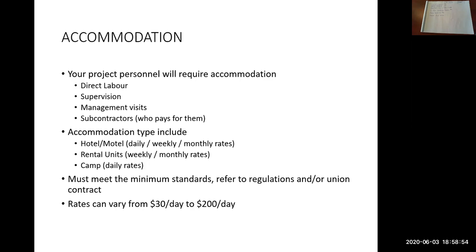So accommodation type, those things can include things like a hotel or motel. Depending on the duration of the project, you may be able to establish a daily, a weekly, or a monthly rate. Typically, the longer the duration, the higher the rate that you want. What I mean by that is, if you're there for 6 months, you want to establish a monthly rate with the motel or hotel.